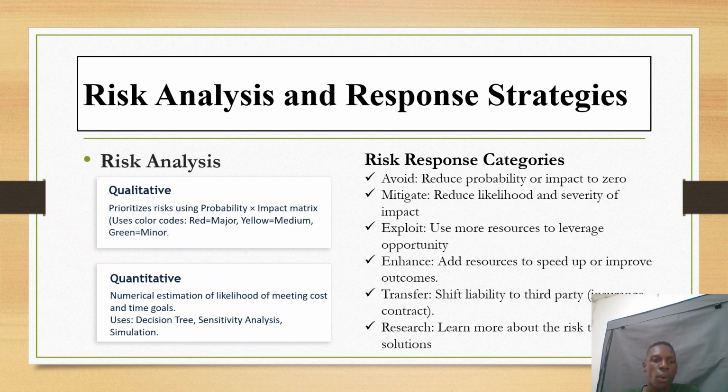Whereas under quantitative risk analysis, numerical methods are used to estimate the cost and time patterns and their impact. It uses decision trees, sensitivity analysis, and simulation.